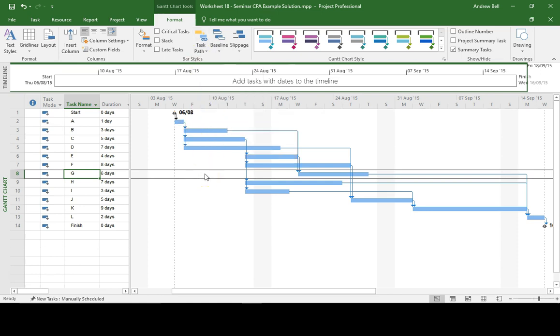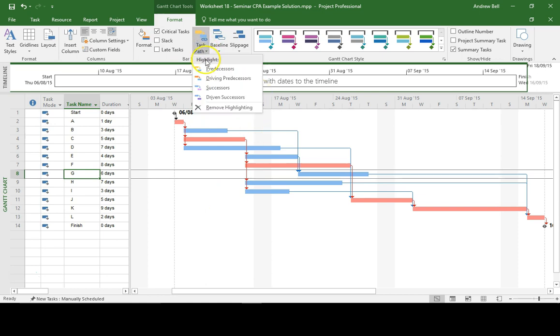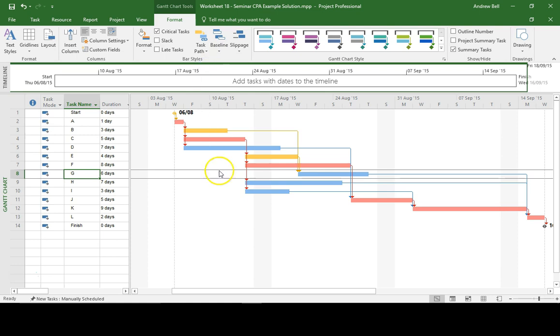Now just let me show you what happens when I actually put the critical tasks on. The critical task overwrites the highlighting in Task Path. So if I now ask for predecessors, it's going to show me tasks B and E. It's not showing me task A which is critical.